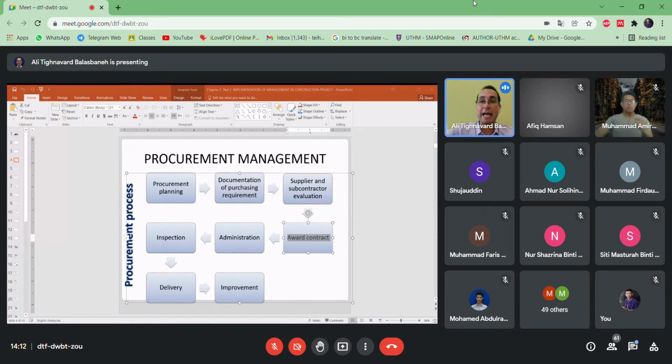You remember last week we checked 7 different methods for calculating the cost. Some of the methods are only good for a hospital or a school. Some others had a different function, more comprehensive. So you already need to assess your project: how much does it cost? And then out of all the tender collaborators, you choose the lowest one, but at the same time it should be realistic to the figure you already calculated.